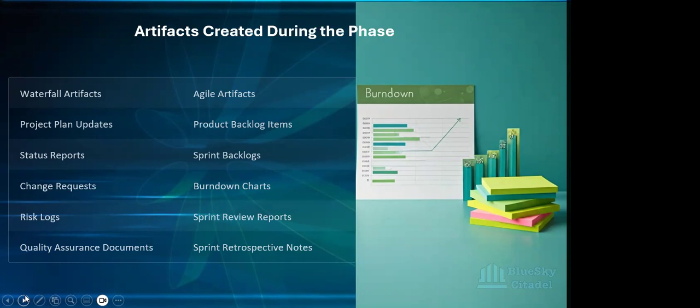Like I said before, you will have predetermined milestones. At those milestones, you will look back so the stakeholders know what has happened. These are the lessons learned, these are the risks, and these are the issues that have occurred. You will let them know if the deliverables of the project are still on budget and if it's going to be completed on time. Those are the kind of things you have in your status report.